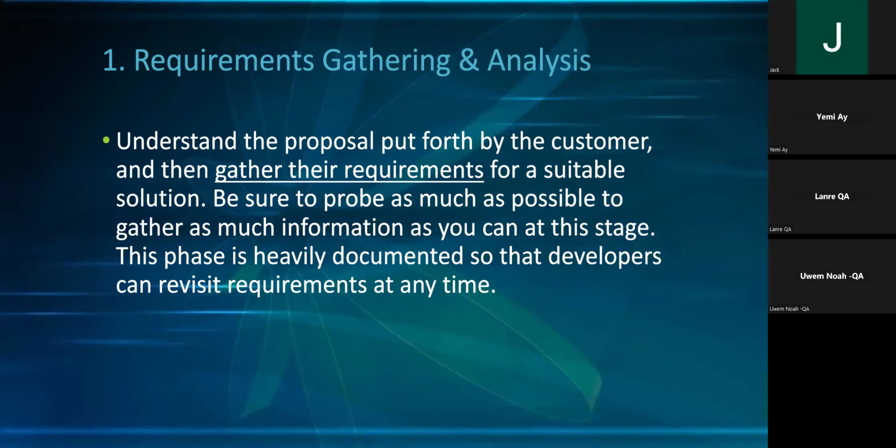The reason is that if a customer gives you information about their needs, my advice is always, maybe as a business analyst, as a product owner, as whoever is getting the information, even you as a tester, if you don't have a BA in the organization, once you are given a requirement, you've discussed with the business, you've discussed with the client or the customer, put it back into writing and let them know.